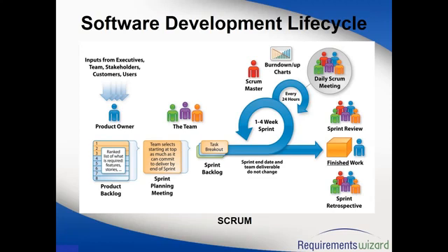The only difference is the sprint retrospective is done at the end of each sprint. So you don't wait until the end of the project. At the end of each sprint, you will do this meeting. Here we don't call it lessons learned, we call it sprint retrospective. But the concept is exactly the same. What went well in the sprint so that you can repeat it in the next sprints? What did not go so well in that sprint, so that you avoid those things and don't do it again in future, and you capture the best practices and share them with the team.